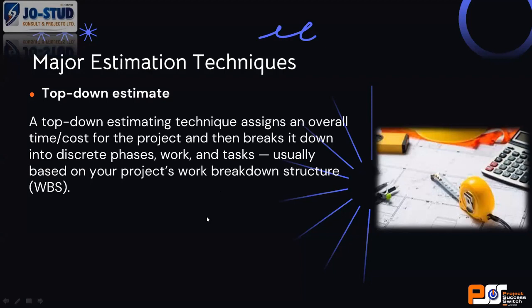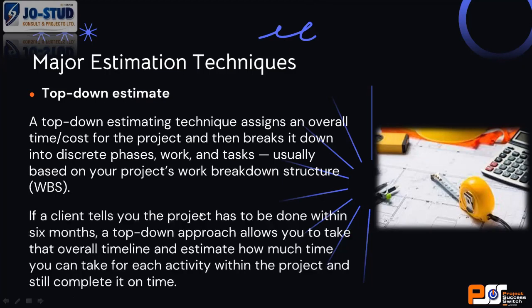For example, for the foundation, if you have tasks 1 to 9, you need to spread the foundation budget across all the tasks so that you do not exceed it. If you exceed your budget, you may not have the money to complete the rest of the foundation.